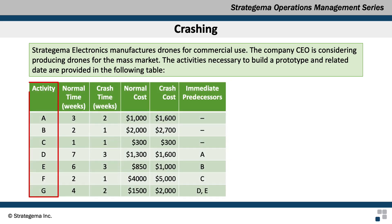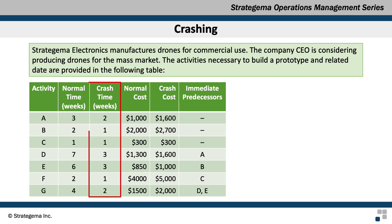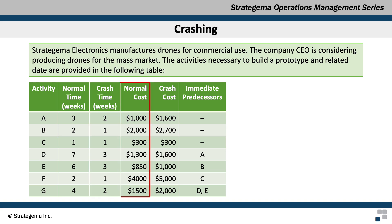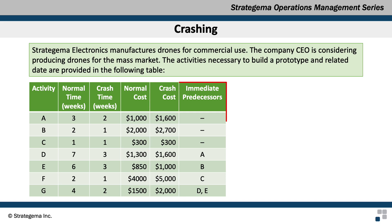Here we have seven activities A through G, their normal completion time in weeks, the crash time — which means the minimum time within which the activity can be completed — the normal cost associated with the normal time, and the crash cost which is the cost after crashing the activities. We are also provided with the immediate predecessors so we can determine all of the paths to completion.